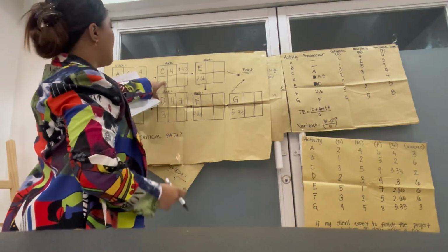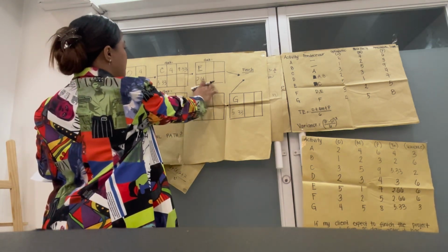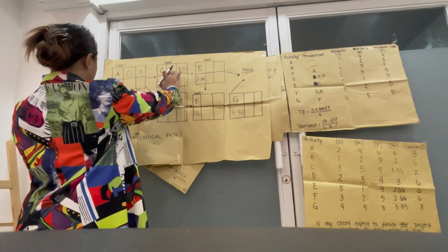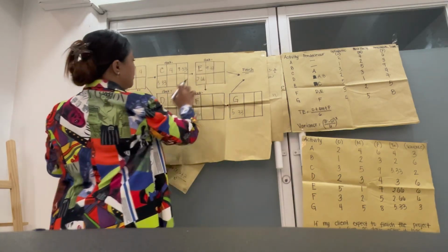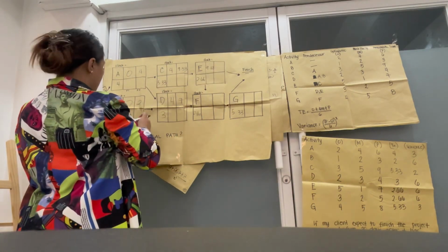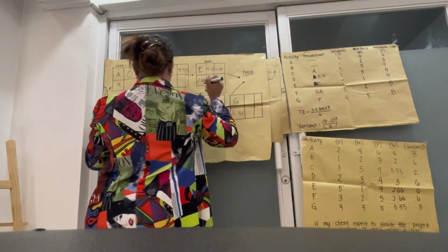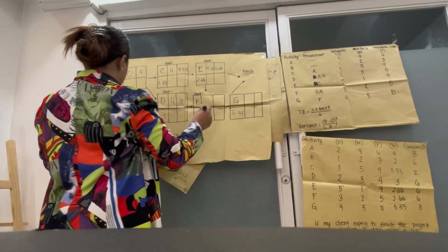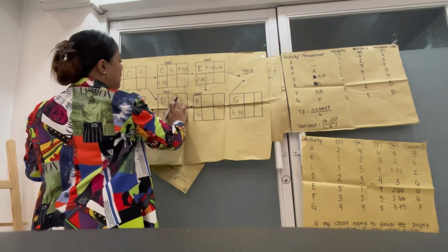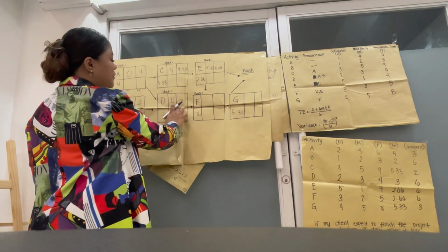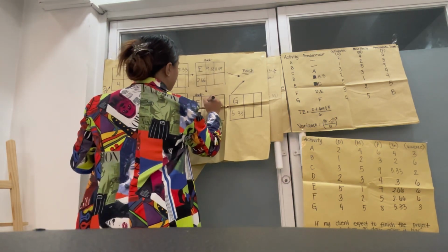So here, for letter E, the earliest start comes from letter C, so we have 9.33. You need to compute 9.33 plus 2.66, which is equal to 11.99. Next is F. You need to find the largest number, which is 7 or 11.99. So the largest is 11.99.